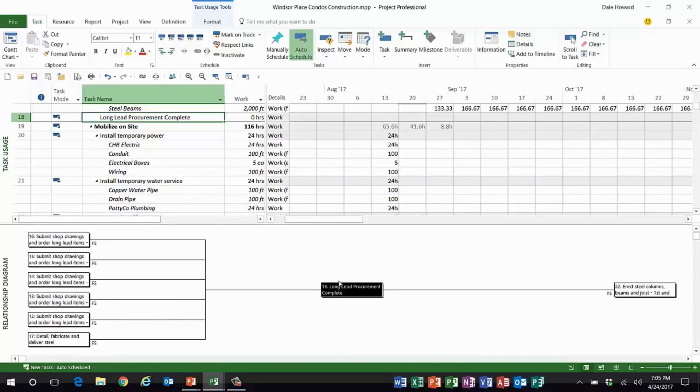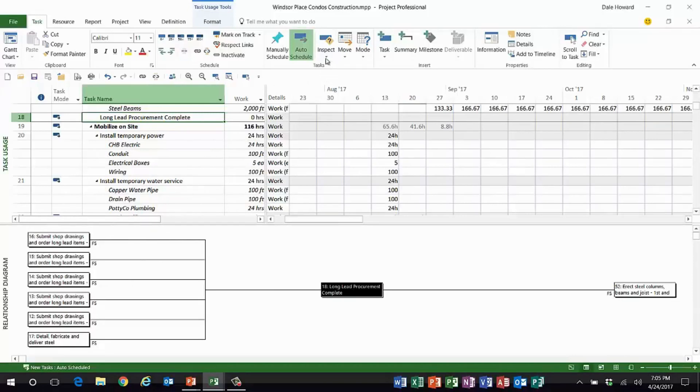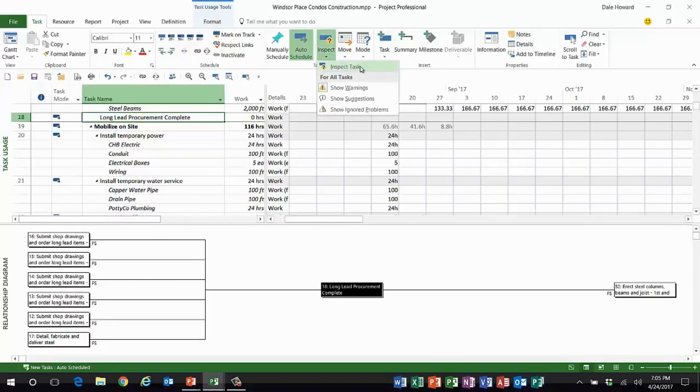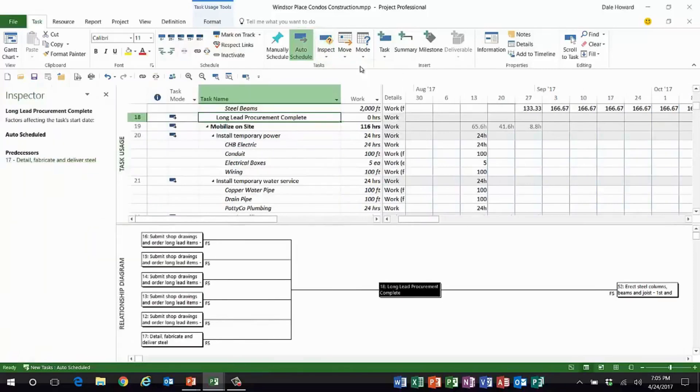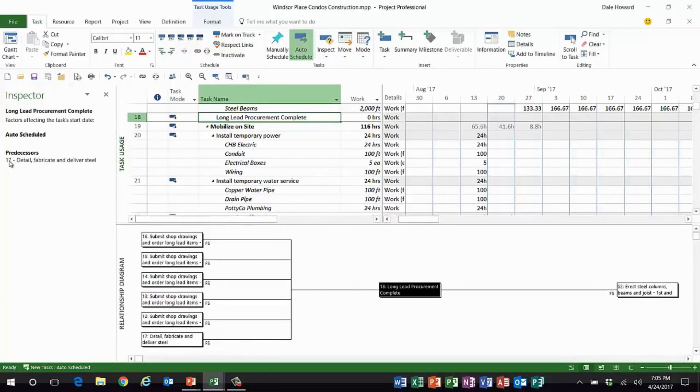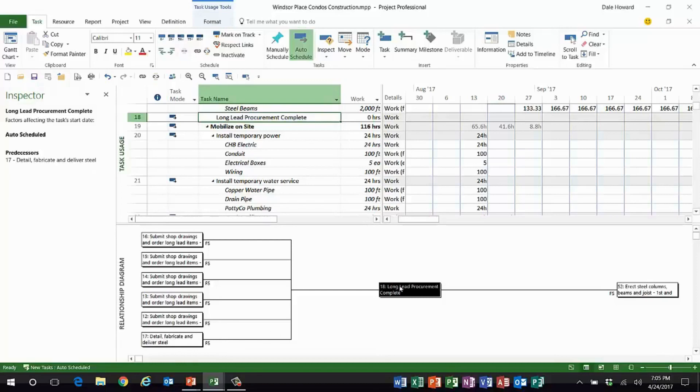Which is the one that's ultimately controlling the schedule of this task? So in addition to this special combination view, I can also use a built-in feature in Microsoft Project called the task inspector. If I bring up the task inspector side pane on the left side, it reveals that task number 17.